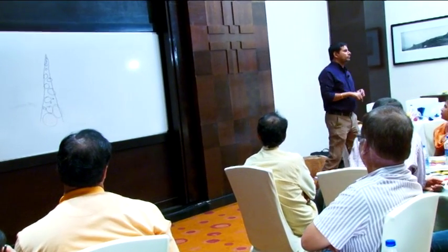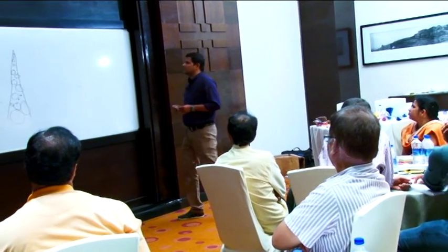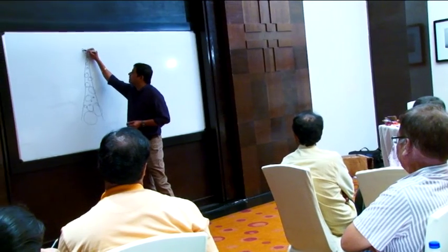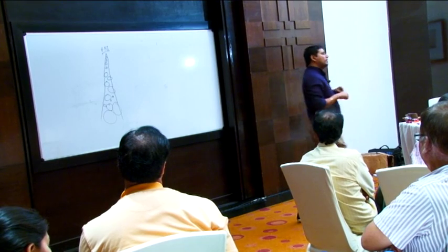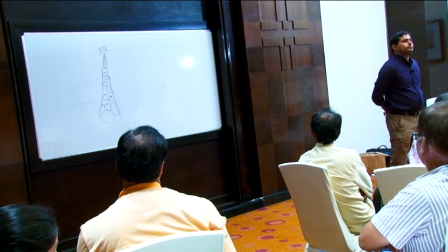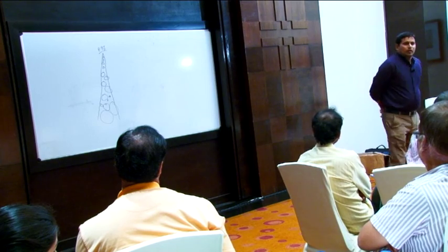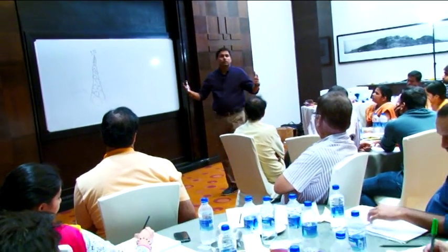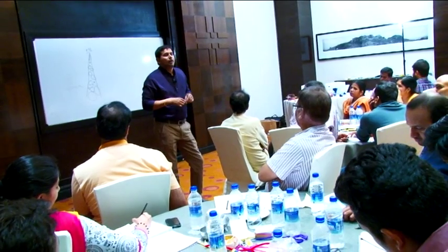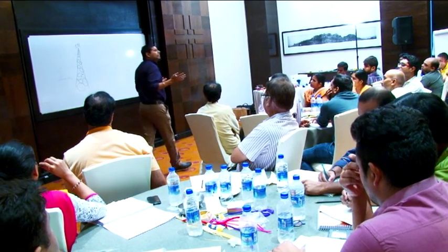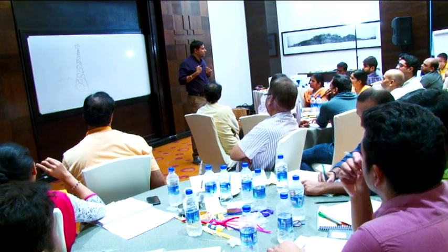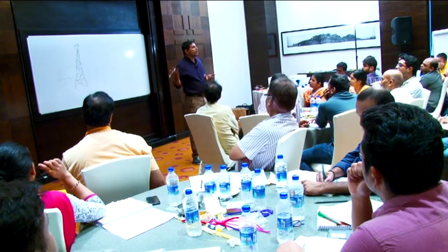So the bigger one is called epic, right? Epic means the bigger backlog items. In the Scrum language, we call them PBIs, product backlog items. So when you have an epic, what do you mean by epic really? Bigger. How bigger? It adds value to a particular function. How much bigger? I may not be able to deliver it in one sprint. That's bigger for me. Right? Because your principle number 1 is violated.